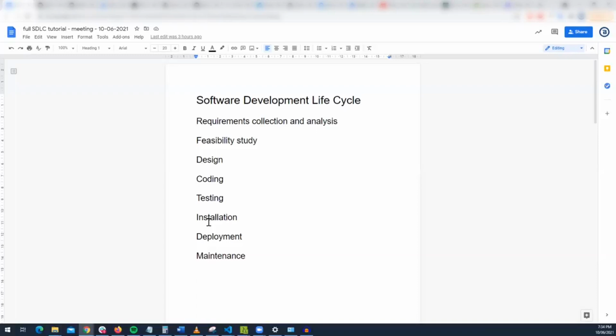If it's some sort of really risky project where the requirements have to be set at the very beginning, and you can't have the scope changing throughout the project, then you'd probably use waterfall. But the thing is, when you're planning out the requirements, you're going to probably spend months just to figure out the exact requirements that the system needs. Some projects even spend a whole year just trying to figure out what the requirements are, and then the next year you start developing that project. So it really depends on the project that you're doing.